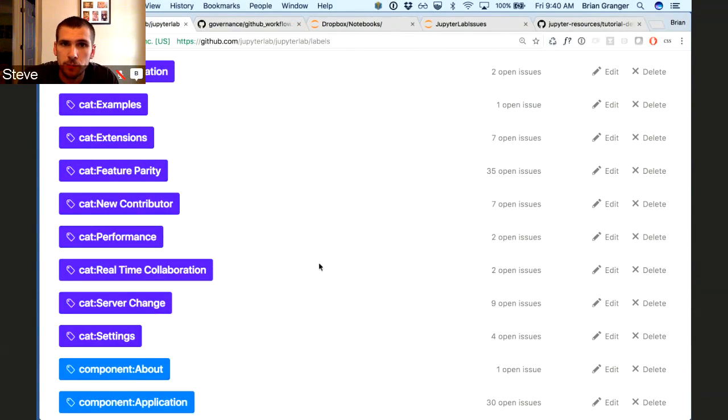Yeah, one thing that's probably worth mentioning is I've started to do regular triage passes. And the way that I find myself doing triage passes now is by milestone and component. So I would say, all right, I'm going to sit down and do a triage pass on all beta issues related to the notebook component, or everything related to the notebook design, or all design and UX on the beta.